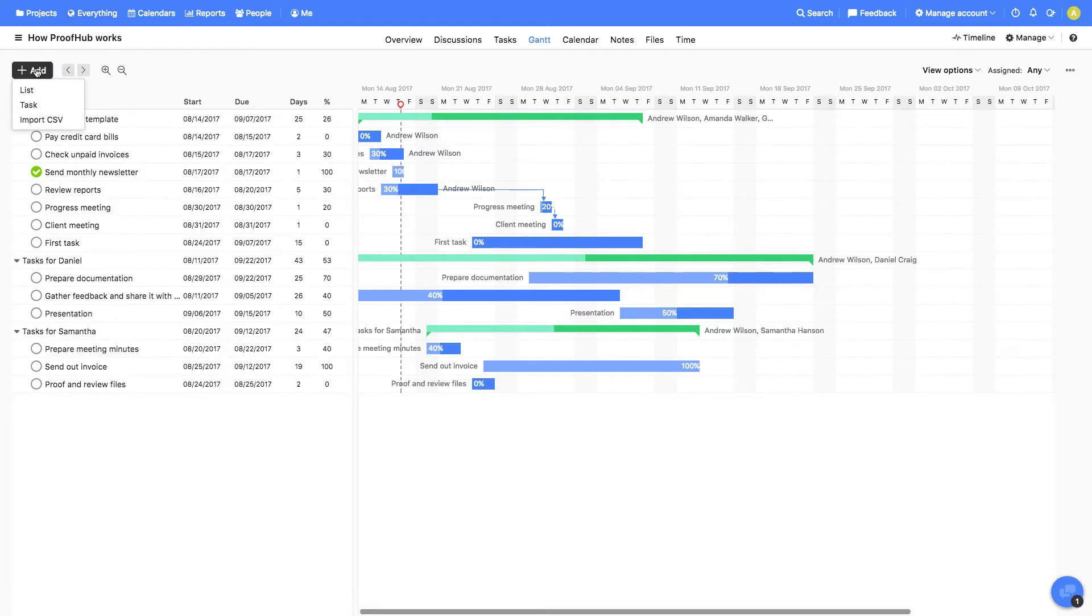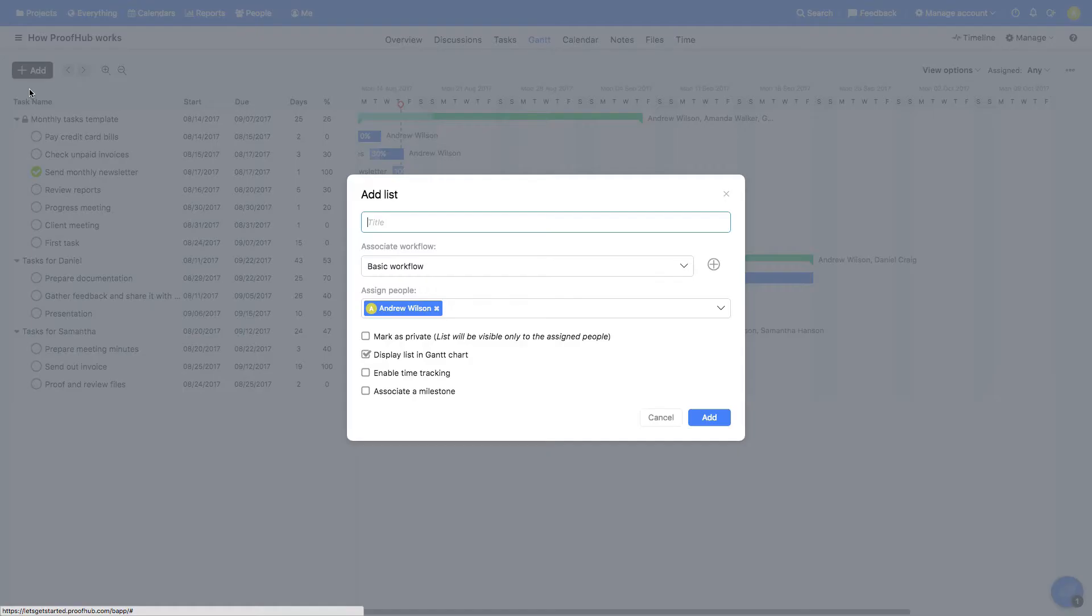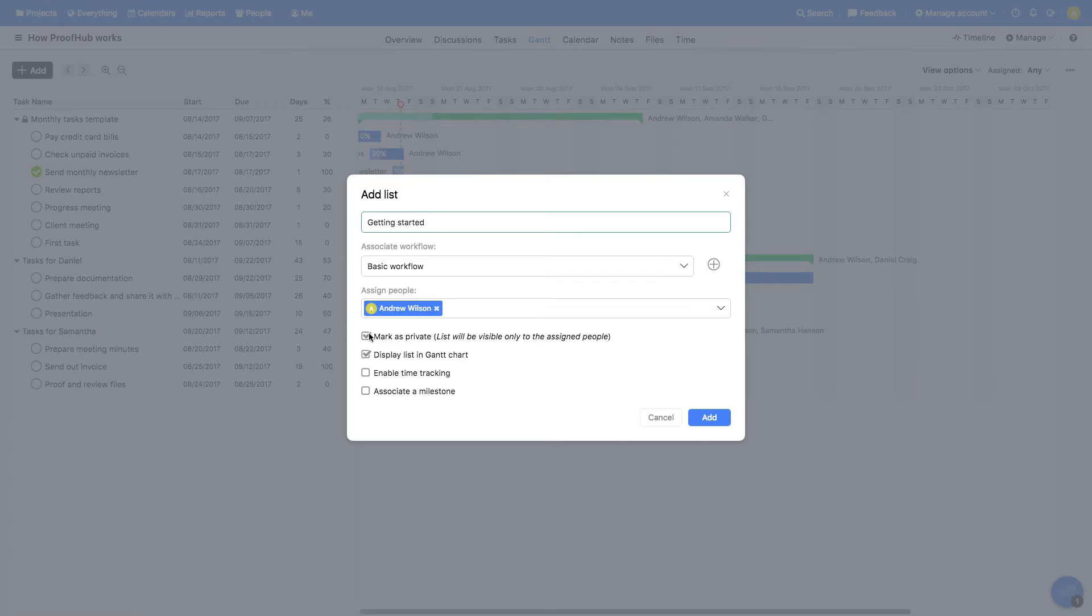You can add tasks in a task list from the Gantt charts. So let's begin with adding a new task list. Give it a title and mark it as private so that no one else gets to see it. You can choose to display the list in Gantt chart, associate it with a milestone, and enable time tracking if you'd like to track the time spent on tasks in this list.